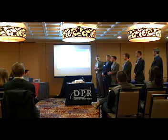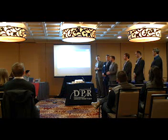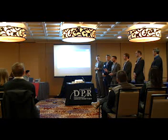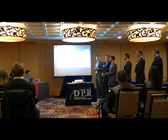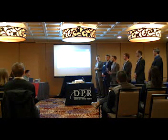Joe said earlier that the certificate of occupancy is another key distinction between contract A and contract B, and this is where it will come into play at the end, where contract A does not require a certificate of occupancy for substantial completion, meaning that we will be a little early and will give us a little bit more liquidity.